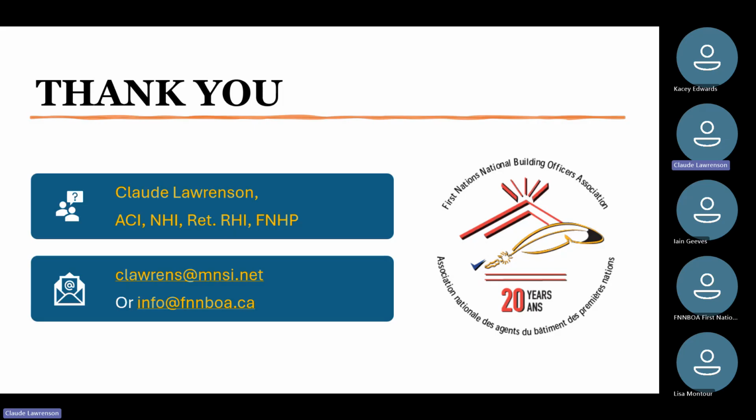A lot of costs when I was doing drawings would vary on the average amount of time spent per drawing. So for example, if I'm doing 10 drawings and I figure it's going to take me 30, 40 hours per drawing, multiply that times your hourly rate. Easily it could be in the high range of getting close to $35,000. In some cases, it might be less. So again, just to give you some ballpark ideas.